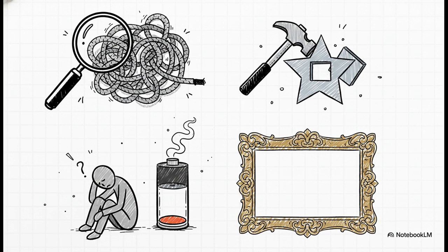Number 3, treating chaotic as forever. Crisis mode feels highly effective in the first 24 hours, but if you keep doing it, you will absolutely burn your team out. Once stabilized, move it to complex. Number 4, mapping only once. Projects migrate. A complicated task might suddenly hit a complex roadblock. You have to reevaluate at different phases. And finally, number 5,